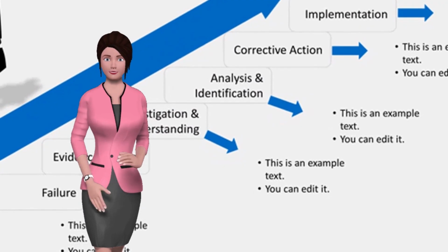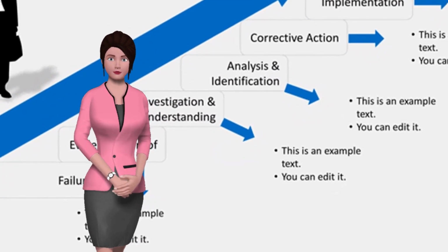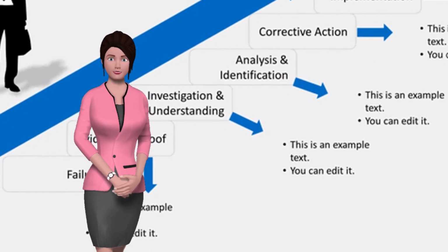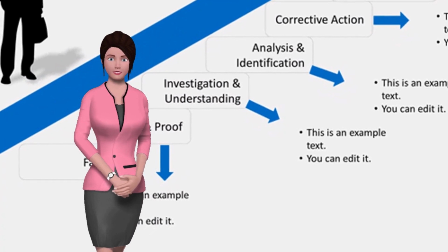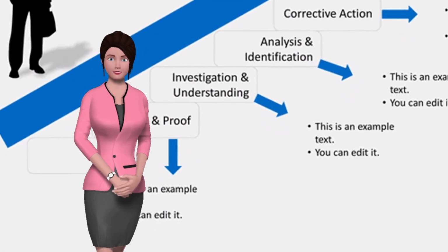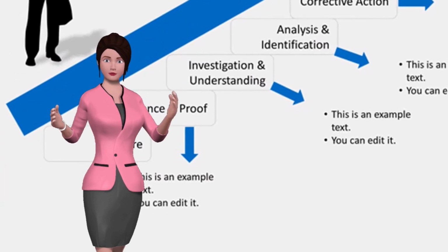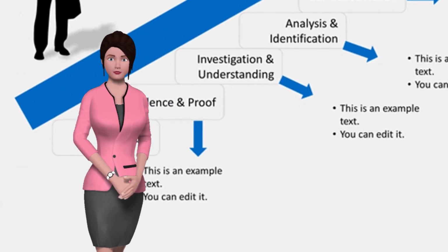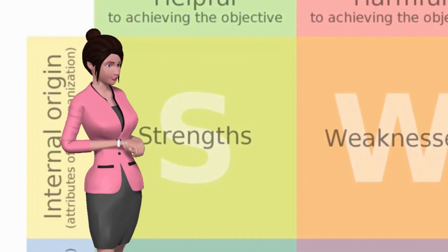To apply this tool, go through the acronym. Begin with strengths and determine what those are as related to the project. Next, list the weaknesses or things that could be improved or are missing from the project. This is where the likelihood of negative risk will raise its head, while positive risk comes from the identification of strengths. Opportunities are another way of referring to positive risks, and threats are negative risks.